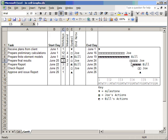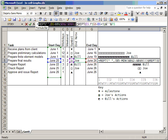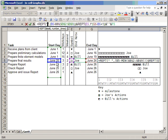We can maybe take a look to see how this repeat function is working. The first part of the formula is repeating a blank space, and that's clearly going to put in the blank space before the bar activity. So it's going to repeat that a number of times, and it's going to take this start date here of June 20th, and it's going to take the minimum date here, and it works out the difference, and that's how many blank spaces it's going to put in, because our Gantt chart will start from the minimum date that's in this column here. So that's the first part. That's going to introduce the spaces before the bar.